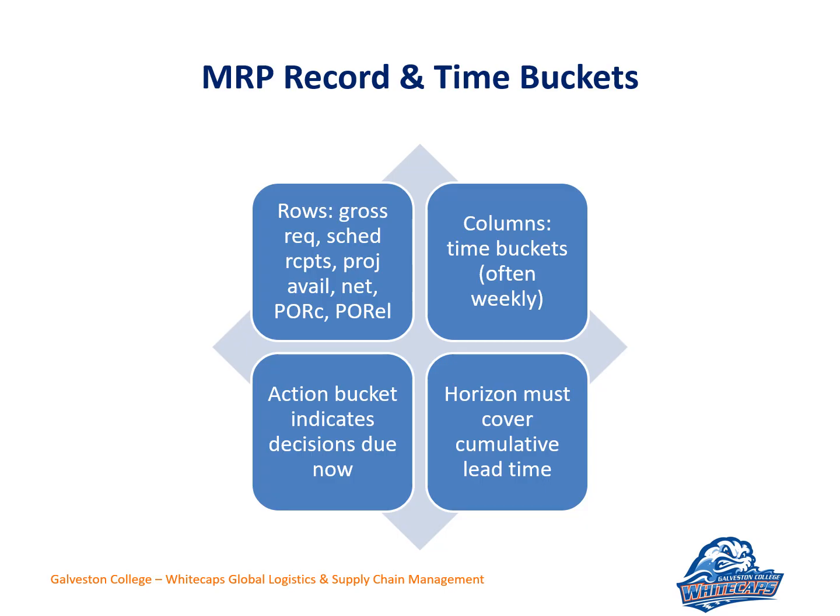So it's okay. I may have 2 weeks where I can adjust, right? But a lot of times, that 2 weeks evaporates very quickly. So always keep in mind you want to see the horizon. It covers all the time. So you say, I know I've got 4 weeks. It's going to be here in 2 weeks. It's going to be released. Great, great, great. I'm going to have 2 weeks to build. Well, is your build time included in that? So, it's just a few more things to consider when you look at the time buckets and how they're set up.